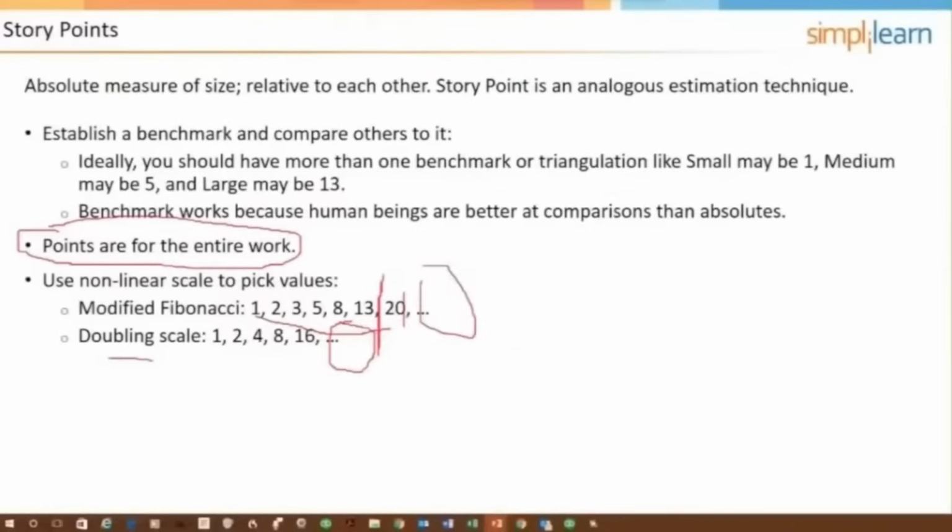So when the team is estimating the size of the user story, they will be including in their discussion and estimates any extra time or buffer time that would be needed for that user story to be completed. So do we accommodate uncertainty when we're using story points? Yes, we're looking at the X factor, and if we've got an unstable user story, then we're probably going to say this is going to be a bigger user story than one that's similar but has a much lesser level of uncertainty.